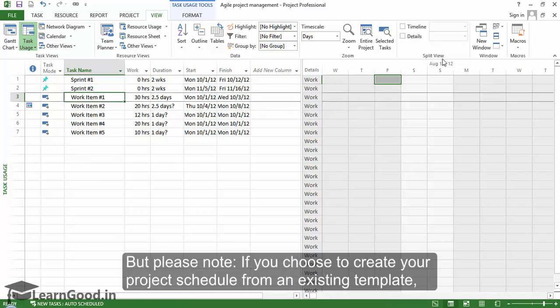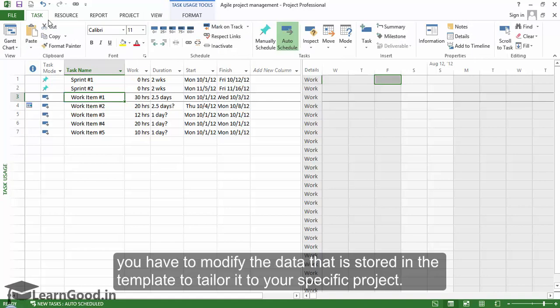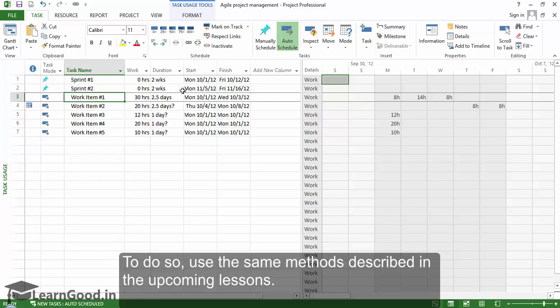But please note, if you choose to create your project schedule from an existing template, you will have to modify the data that is stored in the template to tailor it exactly to your specific project template. To do so, use the same methods described in the upcoming lessons.